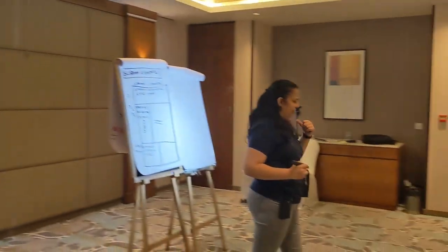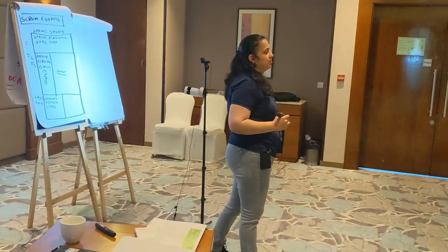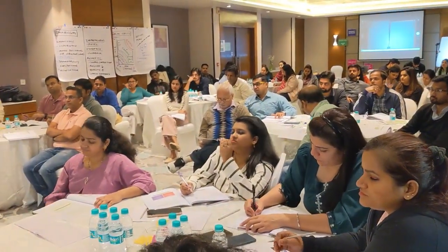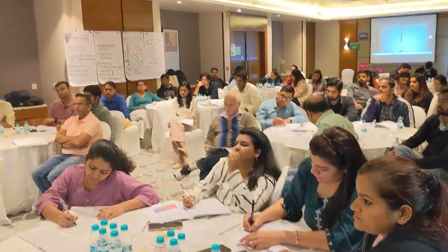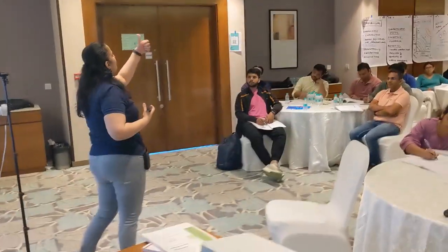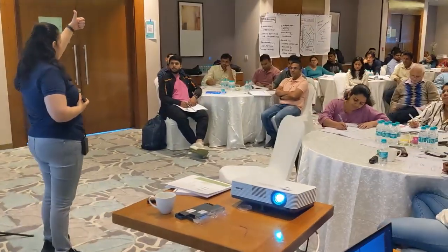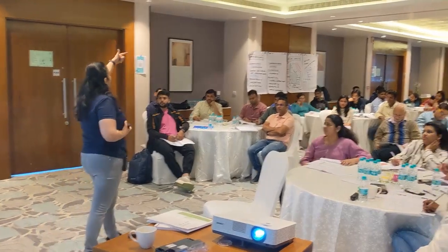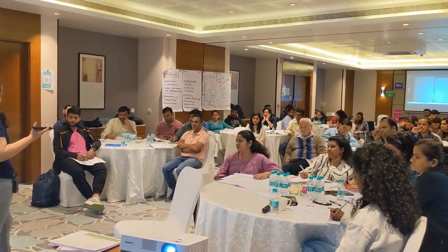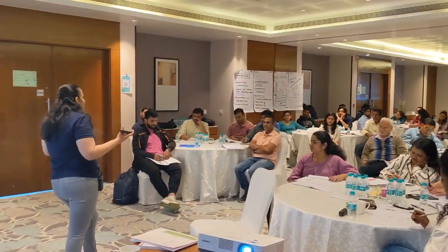Who should be joining for the feedback session? Stakeholders. This is the one Scrum event where stakeholders are encouraged, because we need that feedback. But along with the stakeholders, who else? The Scrum team entirely joins, because we discussed, the increment is created by the whole Scrum team. So the whole Scrum team and stakeholders should be the ones who get the feedback.